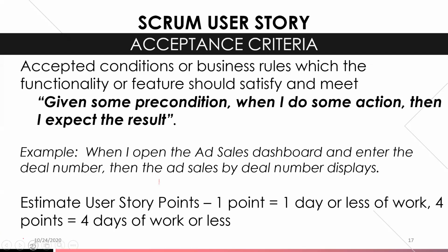Okay. We also, as the Scrum team, estimate the story points, estimate the user story in terms of points. The estimation is to determine how much effort you estimate it will take to do that body of work, such as this story. In the Agile Scrum framework, estimating is pretty much based on the level of effort, and not so much on days of work.